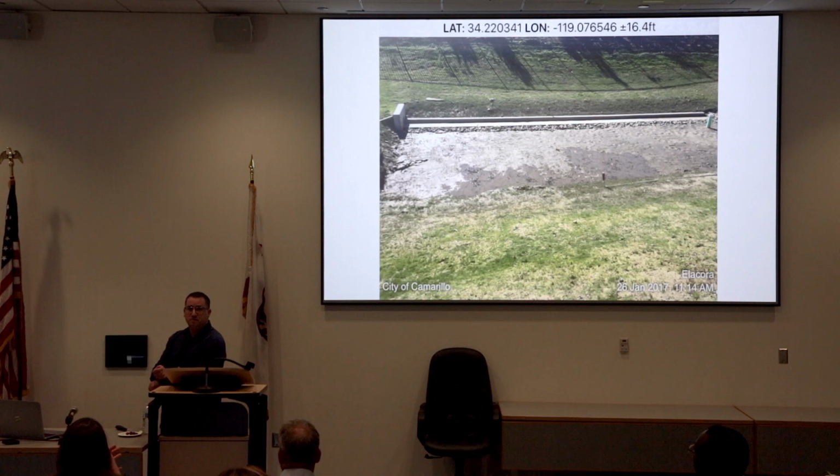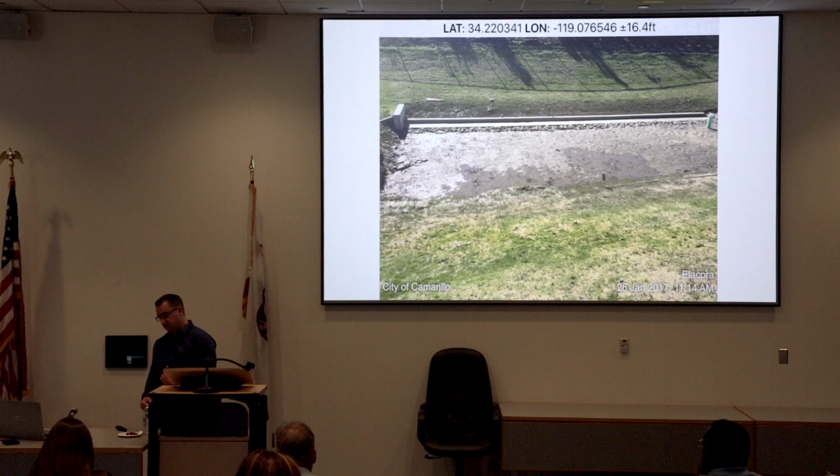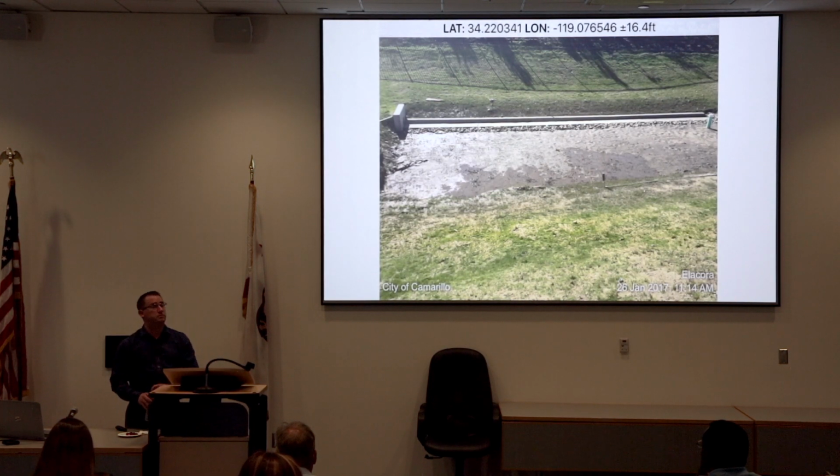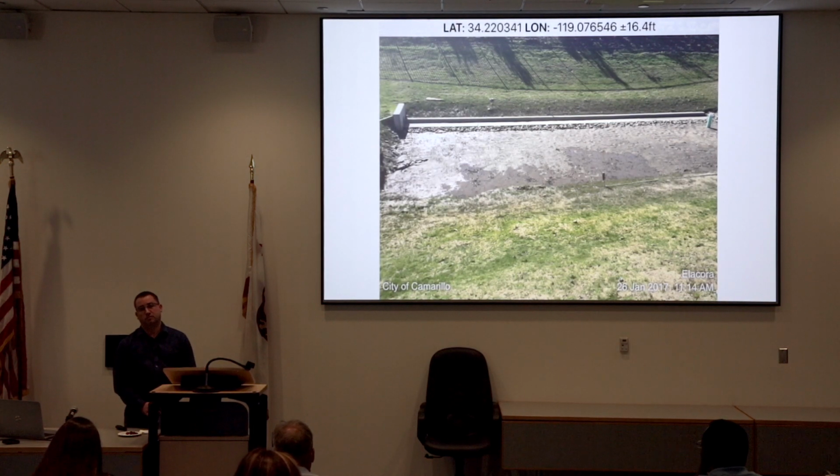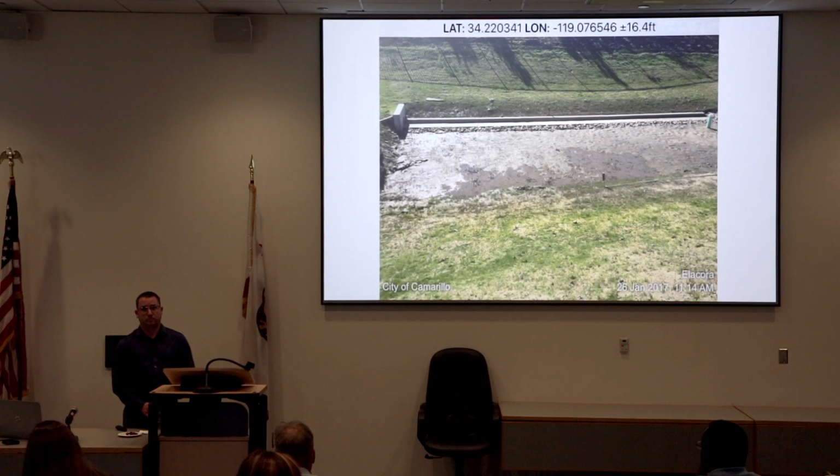Mike? Well, aside from the sand getting silted on top, and then them having to go down several inches to clear all that sediment and not contaminate the rest of the sand, which is a special sand. It's not just ordinary sand, it's specced out. The slopes are stabilized with plants, right? And in the course of the transition from construction to HOA, a lot of the times the HOA won't put enough attention to those slopes, and they end up dry or overtaken by weeds, along with construction debris from the nearby site. And that's been a problem.